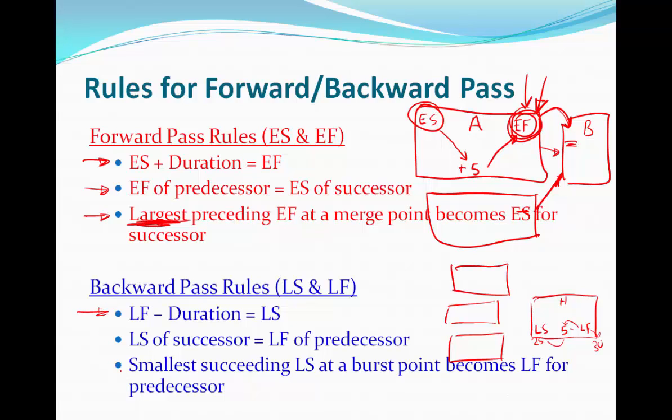The second rule is that the late start of a successor activity is equal to the late finish of a predecessor. So again, if this is the late finish for the predecessor activity, we simply transfer this number over to the late finish.